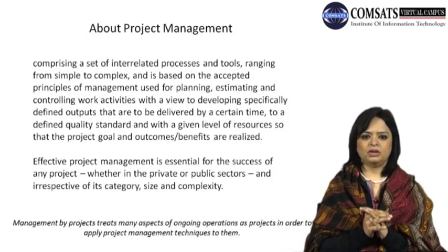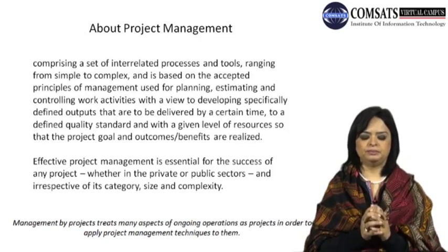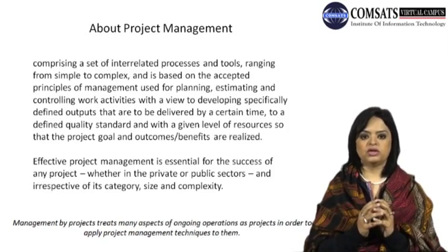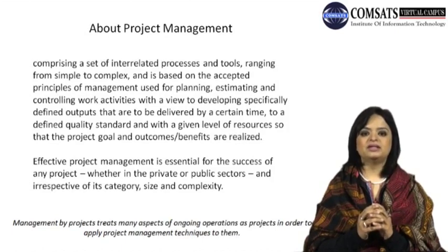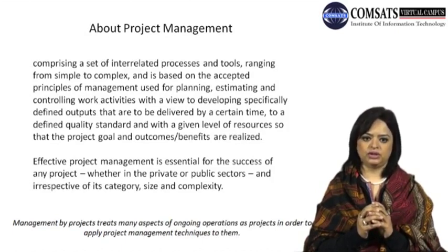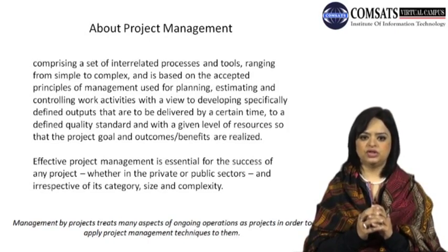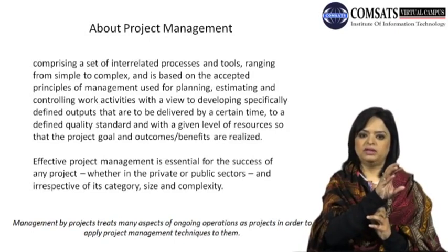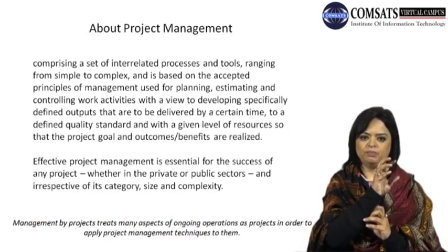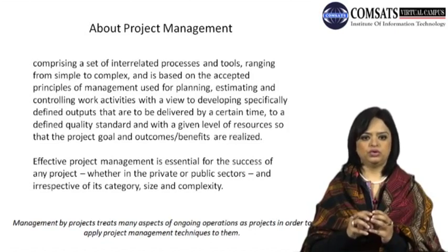I also try to tell you about a situation where during the initiation phase, your customer sees some issues within the charter document, what you have captured in that document, during the dialogues that you and your organization had with the customer or the project sponsoring organization. The customer or your own project organization can decide not to proceed with the project. In that particular situation, when you're dealing with the processes of the initiation phase, you can actually go down to the closure phase.